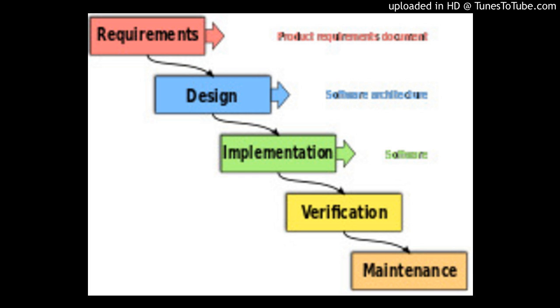It attempts to reduce inherent project risk by breaking a project into smaller segments and providing more ease of change during the development process. The client is involved throughout the development process, which increases the likelihood of client acceptance of the final implementation. While some prototypes are developed with the expectation that they will be discarded, it is possible in some cases to evolve from prototype to working system.